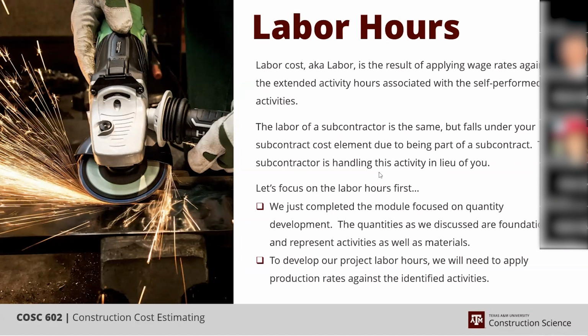Sidebarring for a second, depending upon how a company sets up its summary sheet, I've worked at companies where subcontracts are more or less quantity driven and related to quantity only. And so it's a unit cost against a quantity, and that's the end of it. And I've had others where we try to break out the subcontract hours. And so we'll literally have a quantity column. We'll have self perform hours and a subcontract hours. Then we'll have labor, material, and subcontract costs. So we're trying to track and capture the subcontract hours as well.